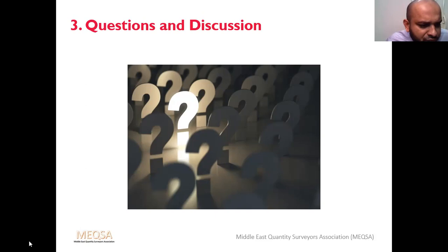Can you appeal if you lose in arbitration or litigation? Okay, I told you, the arbitration award you cannot counter on the basis of fact and evidence. But if you feel the arbitrator is not giving you a proper opportunity, is showing favoritism, is not following the procedures, or is not answering your question, for example you are asking about money and he is talking about time in his award, in such situations you can appeal, and the arbitrator will amend the award and reissue.